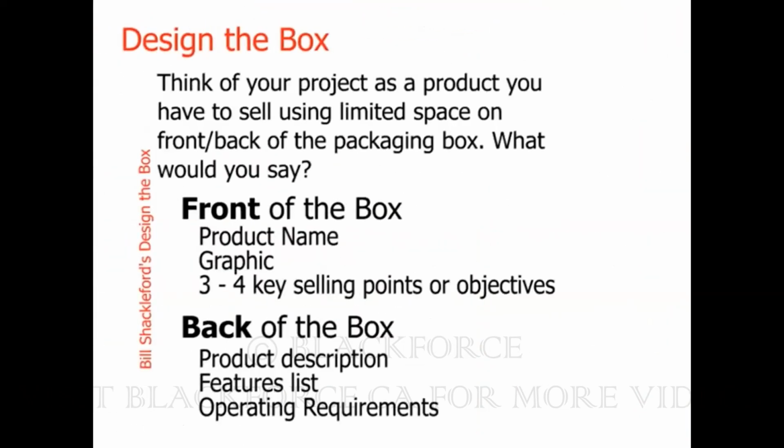The other one that's really popular and easy, and maybe that's the one that we could use today, and Kelly will facilitate that for us, is something called designing the box. So designing the box means that you have very limited space to sell your product and to get it into the market. And so you want to show people that are looking at your product what is the benefit of this product. So the front of the box usually has what is the name of the product, and what are the main benefits of that product? What are the key selling points for it? And then the back of the box has, here's the description, generally what it is, and here's the key features that will be delivered from the product. Make sense, you guys? So that's an example.